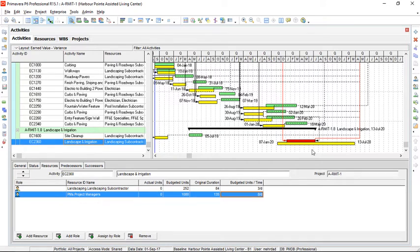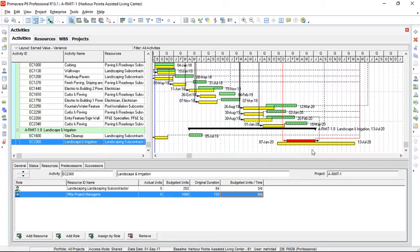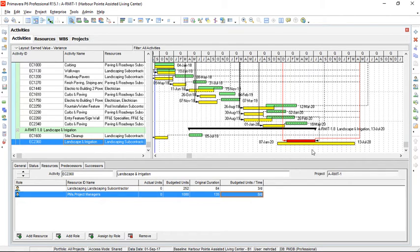It's a very good practice to have milestones for different phases of the project and link those milestones to another milestone for the whole project. So finish of every phase is linked to finish of the whole project. And we can see reduction of activity duration and their effect on project duration.